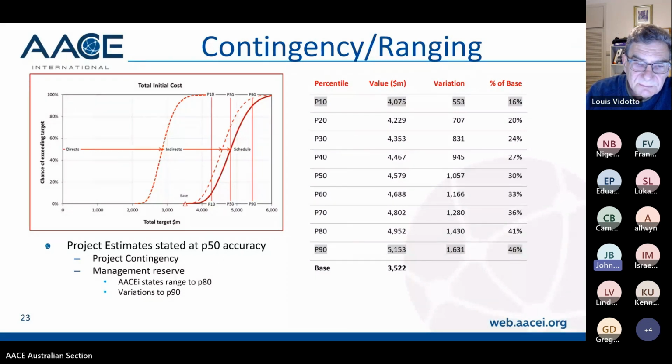Parametric is great. Parametric contingency forecasting. And I think that systemic bit gets missed by Monte Carlo. So I call it the Cyclops eye, where I look at the Monte Carlo, I look at the parametric, and I look at the reference class forecasting to give me an idea what the contingency should be. Don't be a one-eyed monster with Monte Carlo.